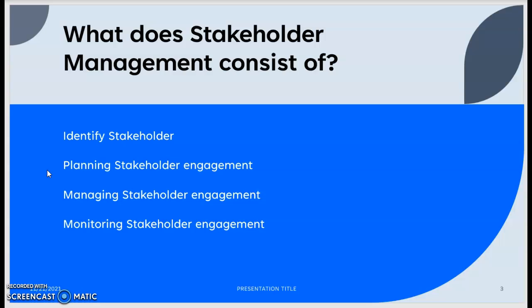Now, in measures of success, you can put things down like time and cost, and in the priority section, you can pretty much use a score of 1 through 4, with 1 being the highest priority and 4 being the lowest. As an example, let's say we needed to redesign a website by next week. Our priority for the measure of success with time would be 1, because we've been given little time to redesign the website, so that should be one of our main priorities.